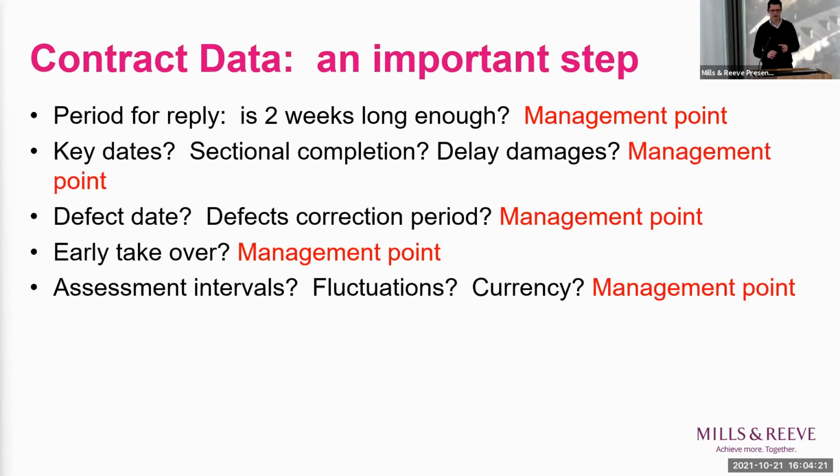Sitting alongside that, loads to do on whether you want key dates, sectional completion, delay damages. There are spaces for you to complete, and unless you complete those spaces, these things will not apply to your contract, so you might not be entitled, therefore, to recover delay damages if that's something that is important for you. Similarly, on the defect date, do you want a 12-month period or a 24-month period? You need to include that within the contract data.